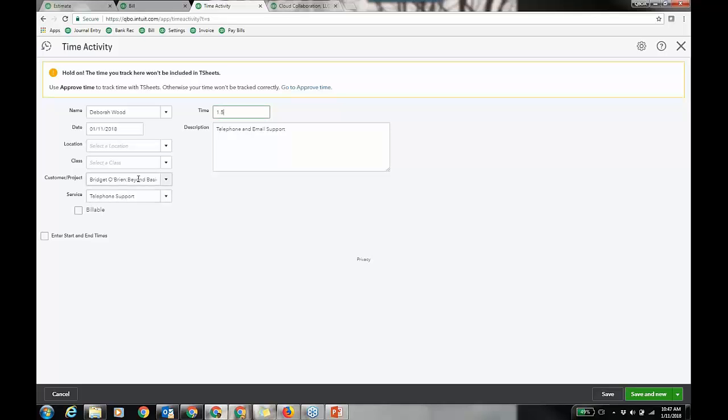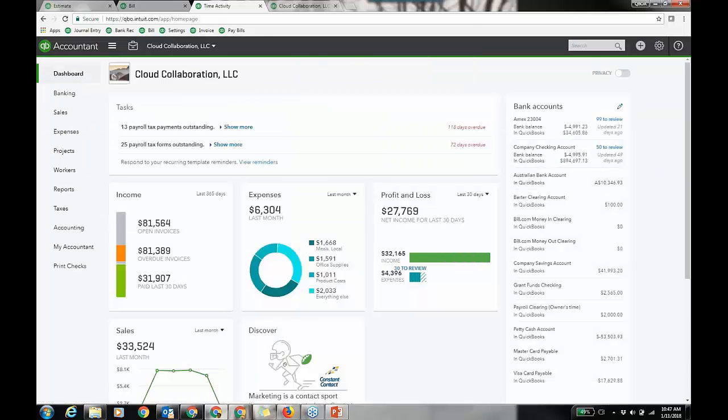Now that brings up a good point. Though the time will flow through to the paycheck in QuickBooks Online Payroll or the online full service payroll, the job tag will not. So again, if you want to see labor burden, I suggest Notify or CoreCon. That visibility is faster, unless there's not many projects. You could do $0 journal entries, I guess, but still, you don't want your client doing those. You're doing those. But anyway, so in the cost form, time entries, you can tag these fields. That's why we turned on those settings if you're passing stuff through to an invoice.